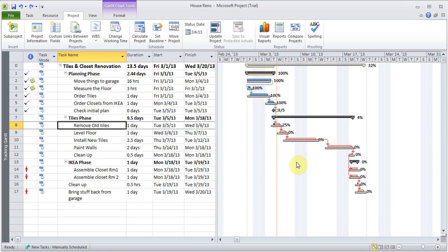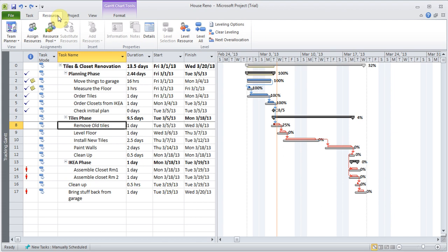And in the previous video I talked about resource leveling. I didn't use that word. I talked about how to deal with over allocation. So I've added myself again on some tasks, and you see the red warnings start to come up, which tells me that maybe Project thinks that there is some over allocation going on. So to fix this problem, the word they use is called leveling. So under resource, there is this level option.